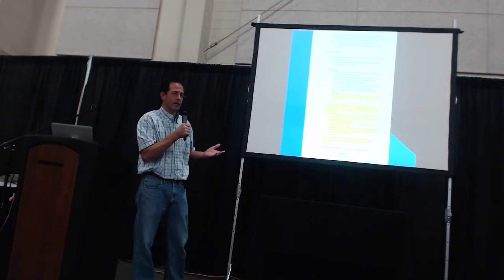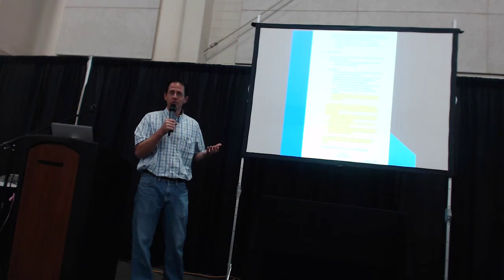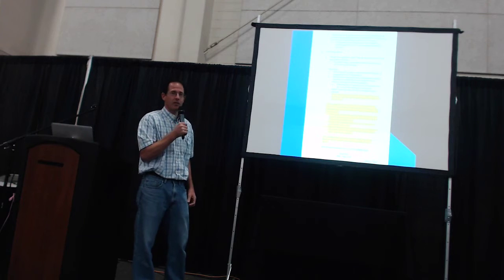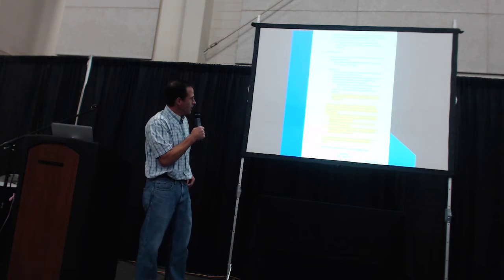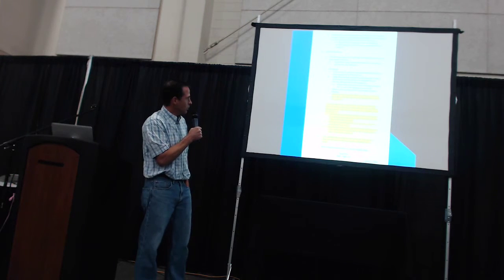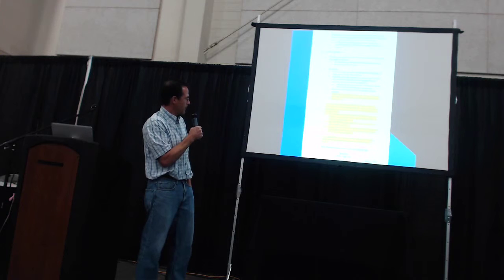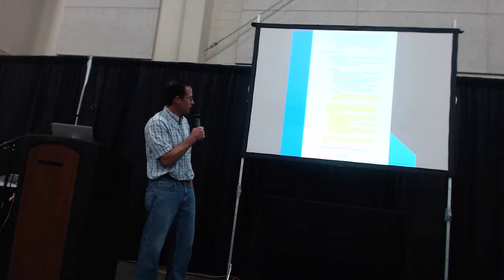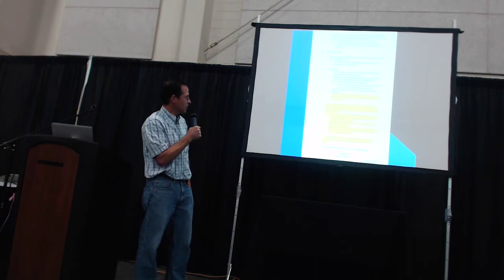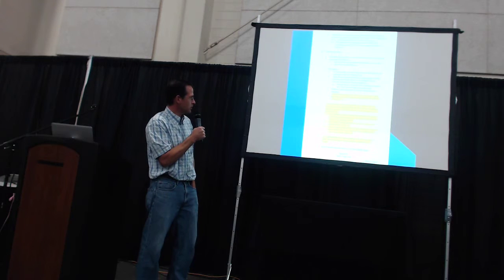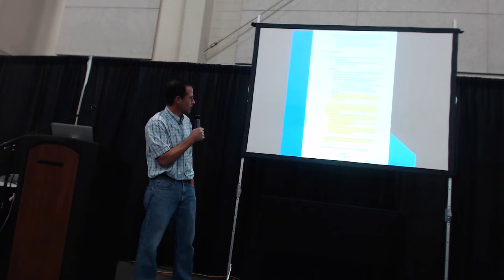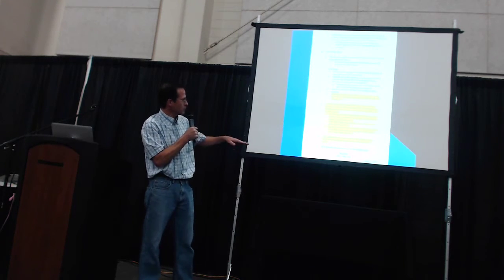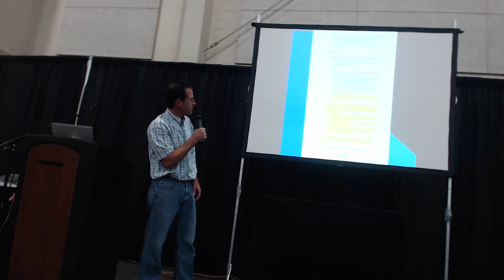And why is that? It's because that's our opportunity to take care of something if there is an issue. Notify the department to determine the appropriate resolution if either requirement is not met. Contractor bears all costs for any measures required to resolve the nonconformance, including the price reduction factors shown in Table 1 in this section, Article 3.5, which we'll look at in just a minute.